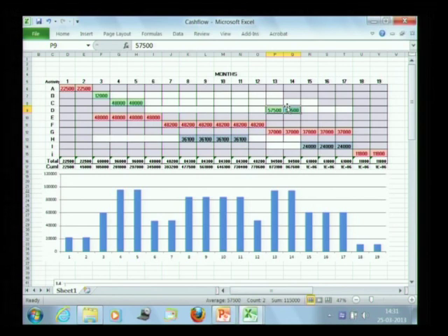Now, because this is a simple network and because we have only one resource here, we are able to shift these things around and find solutions. Obviously we are not adding context to what activities A, B, C are. In the real world, like we discussed earlier, we have to see what we can move and the cost of taking up float and things like that. But the ultimate goal would be to find some way of associating cost with these moves and find the least cost solution to resolving the over-allocation problem.